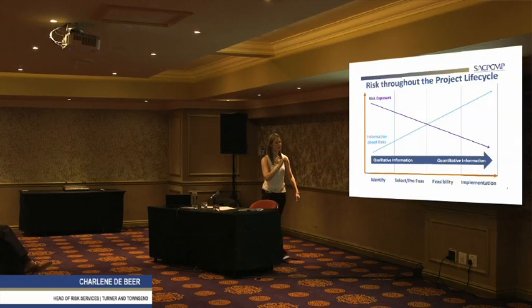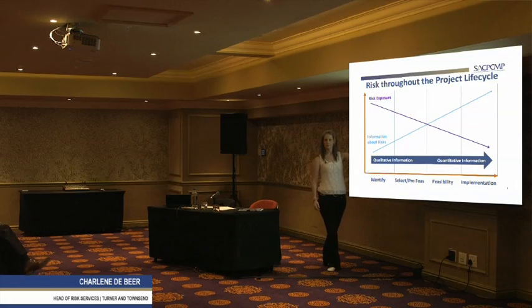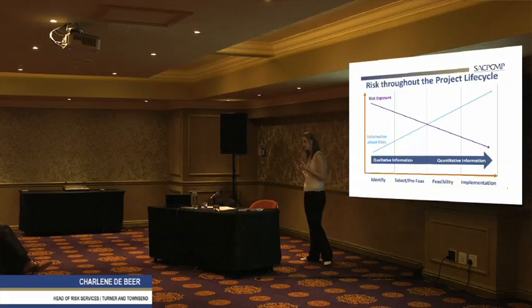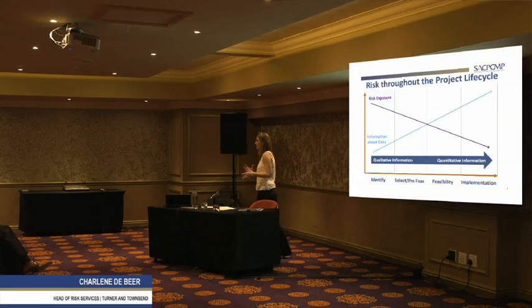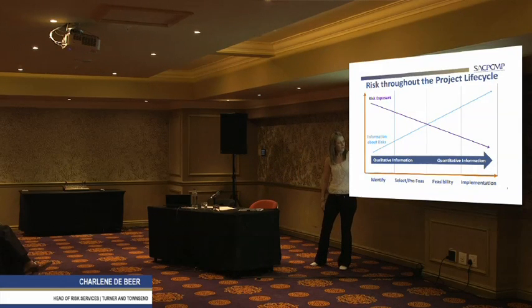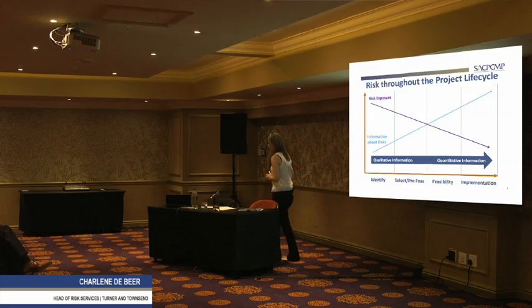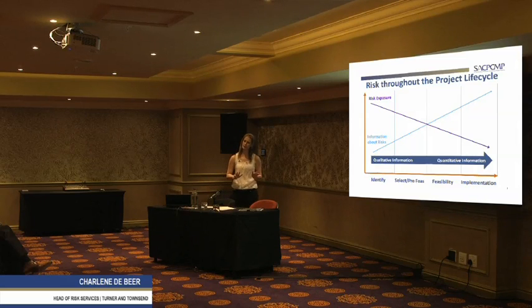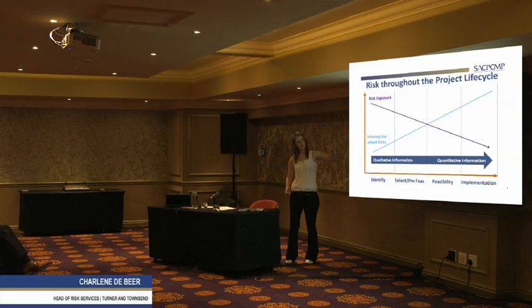because the information we have at our disposal is quite little, because we don't have the design in mind yet, we're not quite sure what budget we want to spend, we're not quite sure what timeline we want to have it done by, it's very difficult to always do a quantitative. So we do qualitative, we identify just the risks without any monetary value on it, and just say, well, these are the risks we face. And then you will see, as we progress through the life cycle of the project,